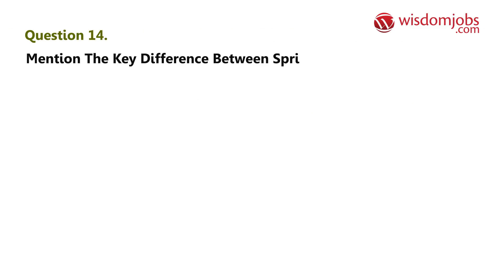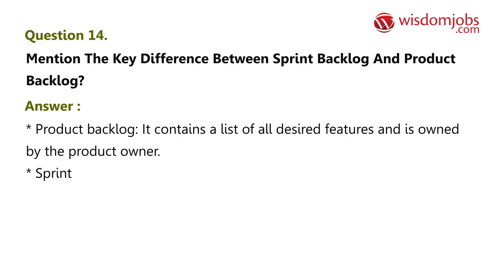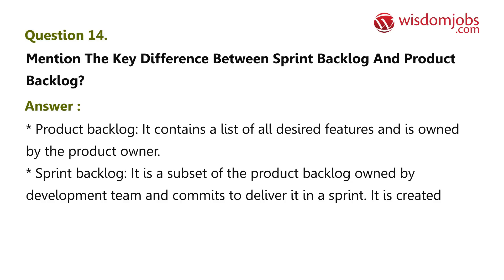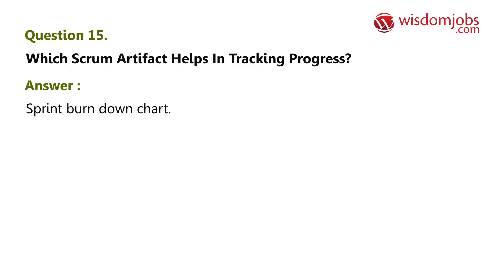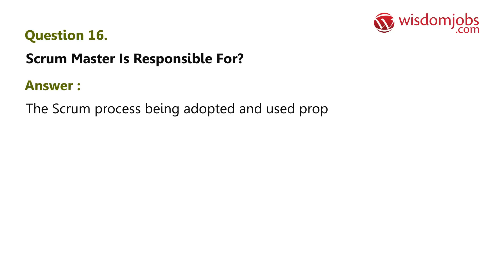Question 14: Mention the key difference between sprint backlog and product backlog. Answer: The product backlog contains a list of all desired features and is owned by the product owner. The sprint backlog is a subset of the product backlog, owned by the development team, who commits to deliver it in a sprint — it is created in the sprint planning meeting. Question 15: Which scrum artifact helps in tracking progress? Answer: Sprint burn-down chart. Question 16: The scrum master is responsible for the scrum process being adopted and used properly.